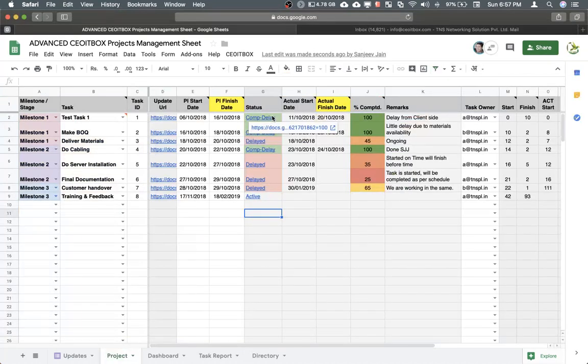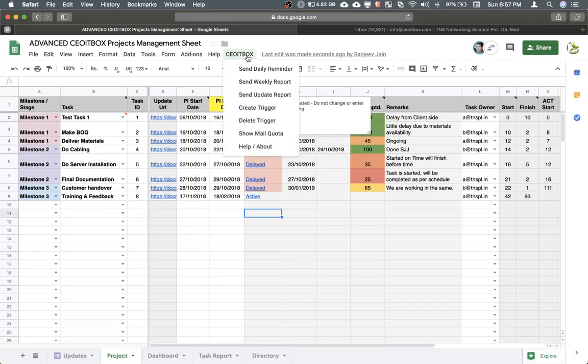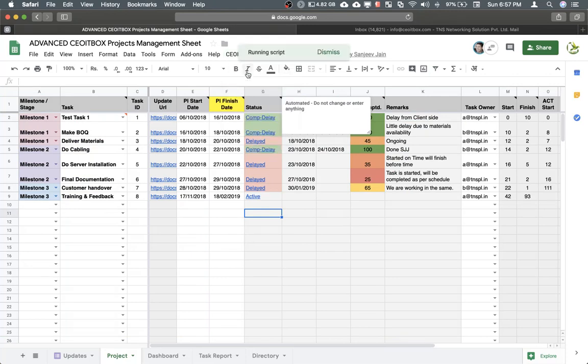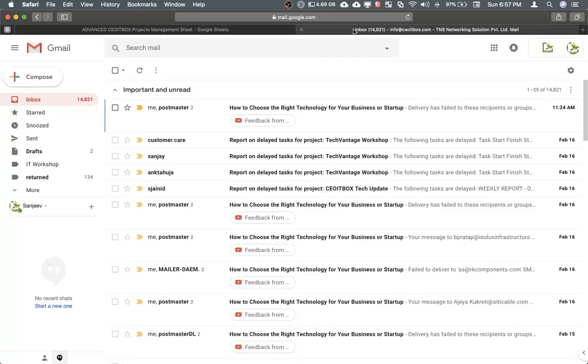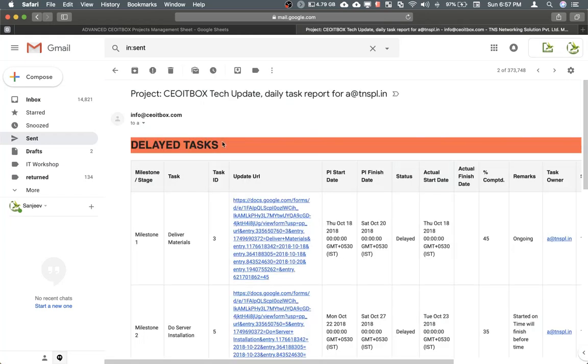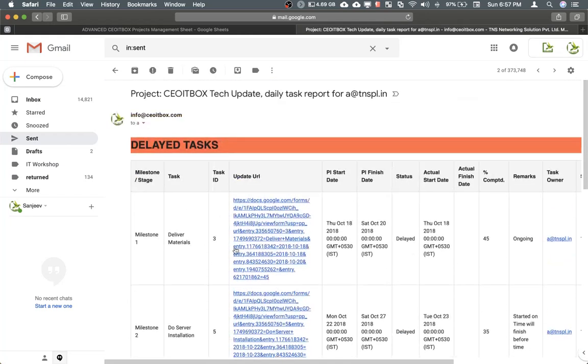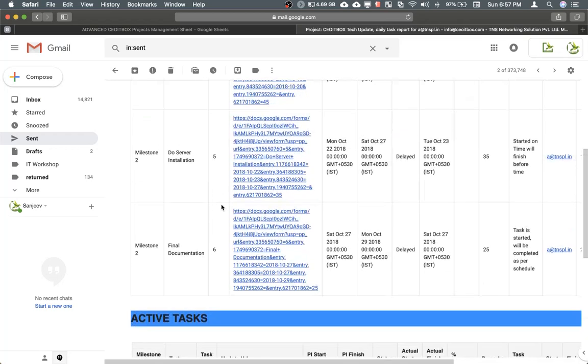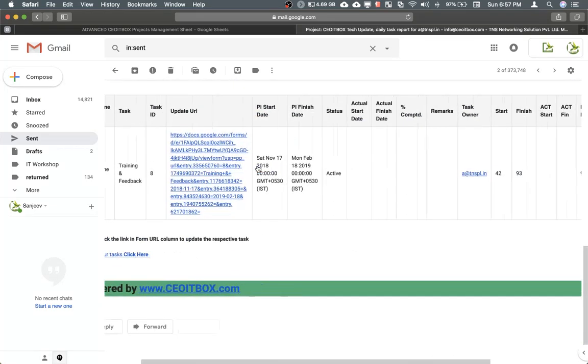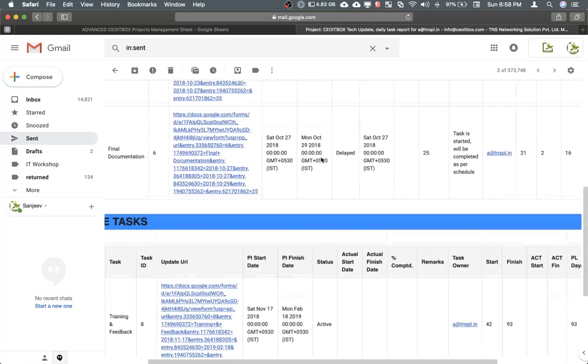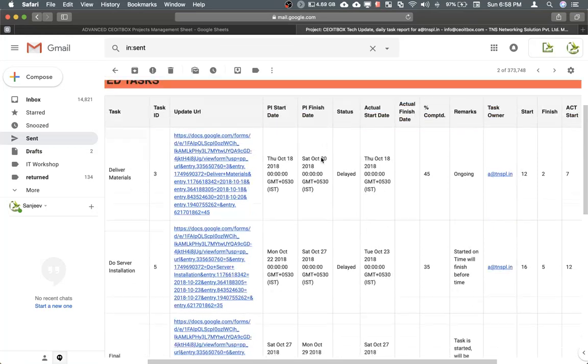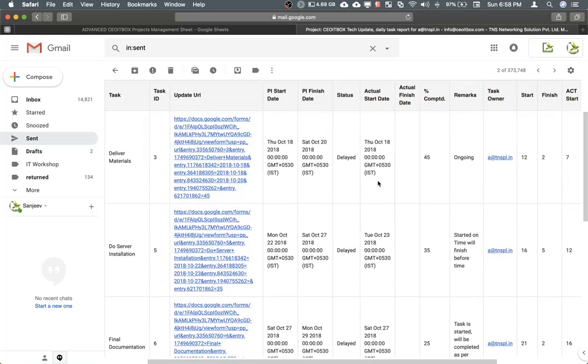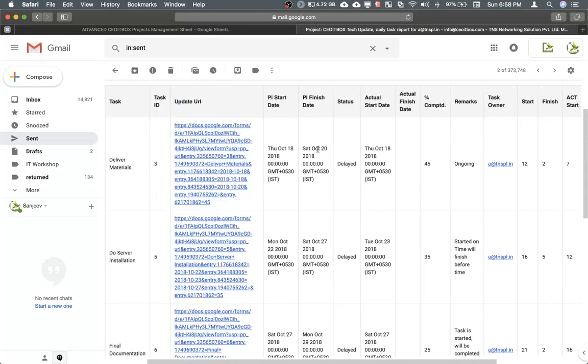Now let me show you how the reminders would go. Normally the reminders would go automatically, but just for demo's sake, I'm going to do it manually. I'll click on send daily reminder. Let us check the sent items here. As you can see, the reminder has gone out to two people. This is Mr. A. This would list all his delayed tasks. These are all the delayed tasks for Mr. A, and these are the active tasks. These are the tasks that have not been delayed. Because the actual finish date was given here as October 20th, but this is not yet been finished.